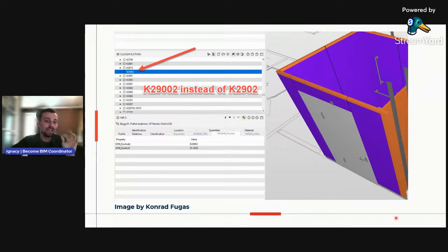So if they rely only on this bad data, it might result that, for example, a work schedule is too tight because they added one more bathroom to their plan and they see they cannot fit into the schedule. Another thing is that the door automation, which was ordered because of the wrong number, is not programmed for these doors. And this is actually only one example from hundreds that I encounter, and every project encounters every day.